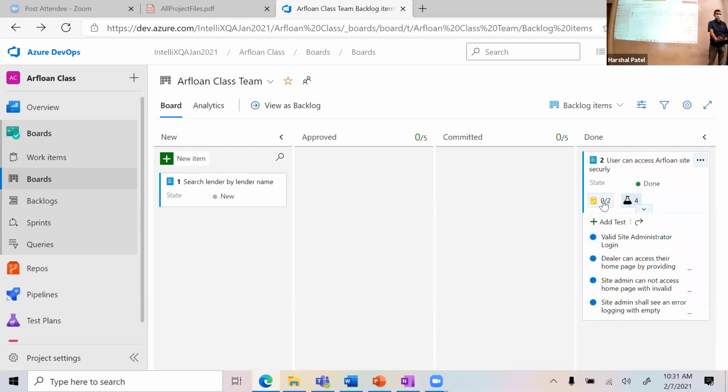What done says is, hey, I completed all the development tasks and QA, all tests passed. Okay, that's generally the definition of done. And then it's ready to be released to the UAT, something like that after this. Or you can have a UAT status here. You can completely configure this Scrum Board with all different kinds of statuses that your team agrees on. Okay, so that's how you move. So everybody who goes to the board will say, oh, this story is completed. These are the two in progress and so forth.